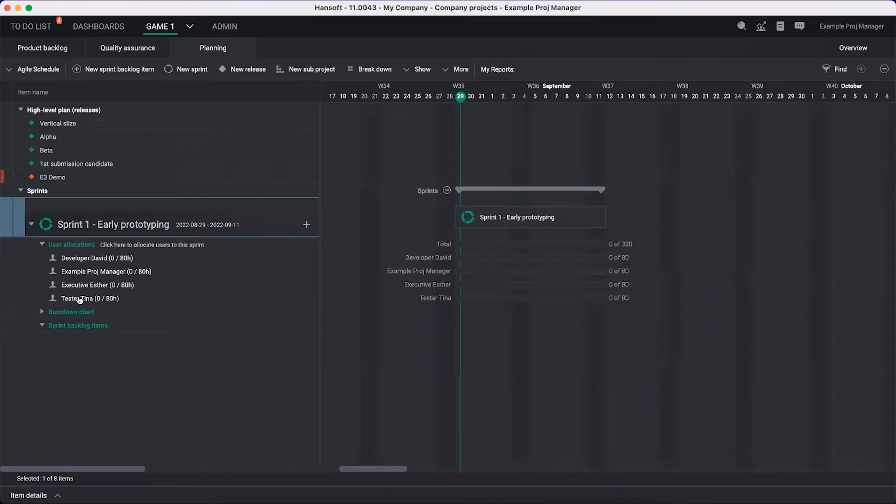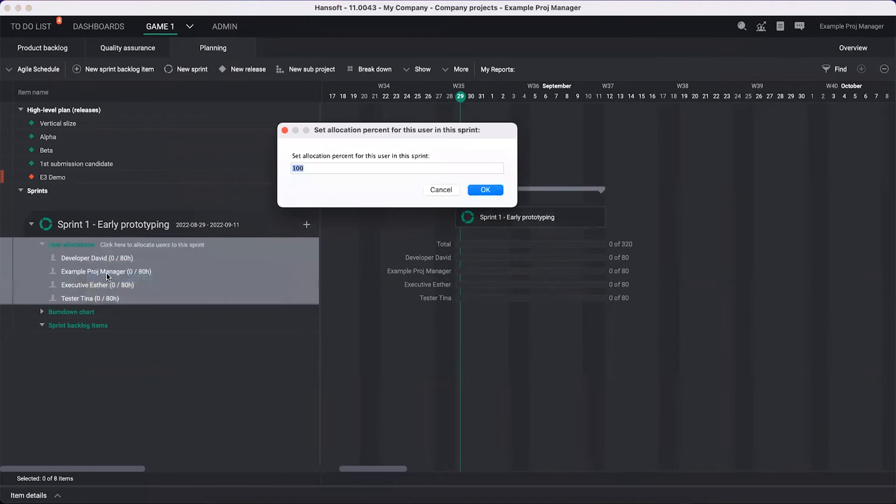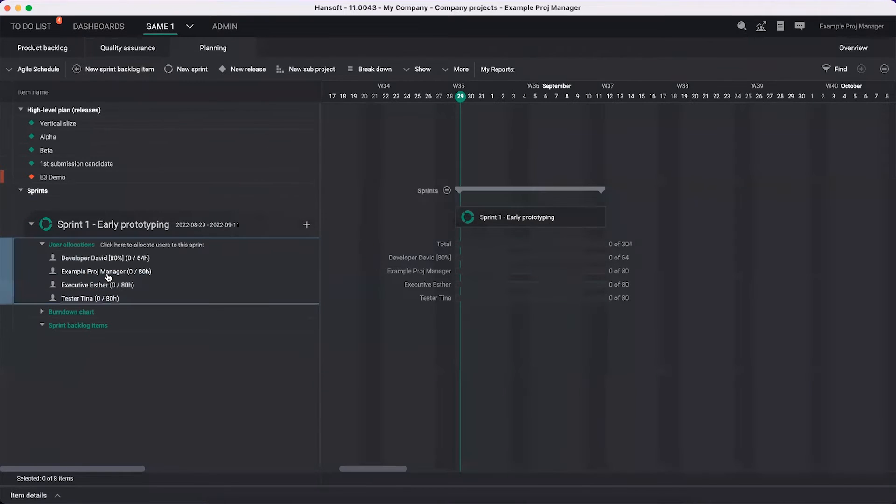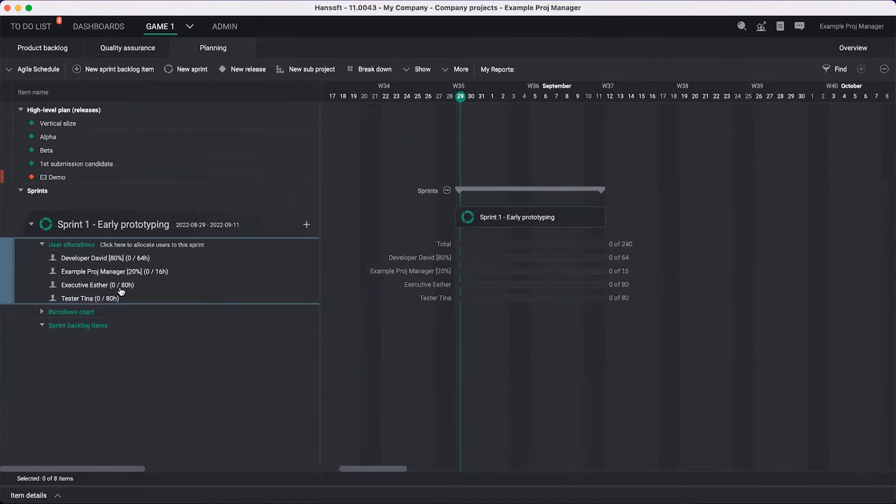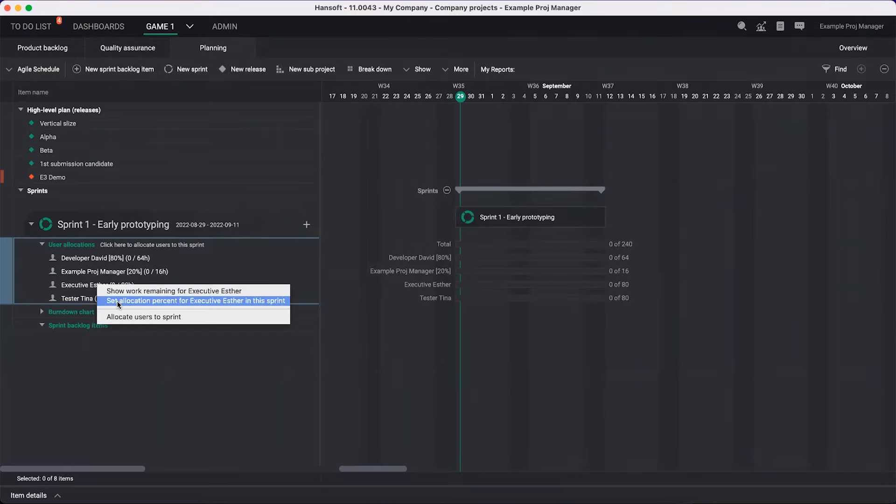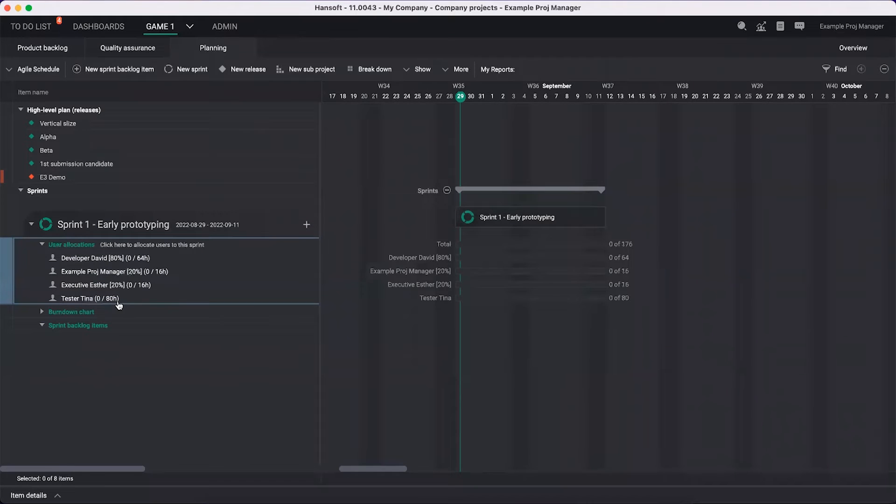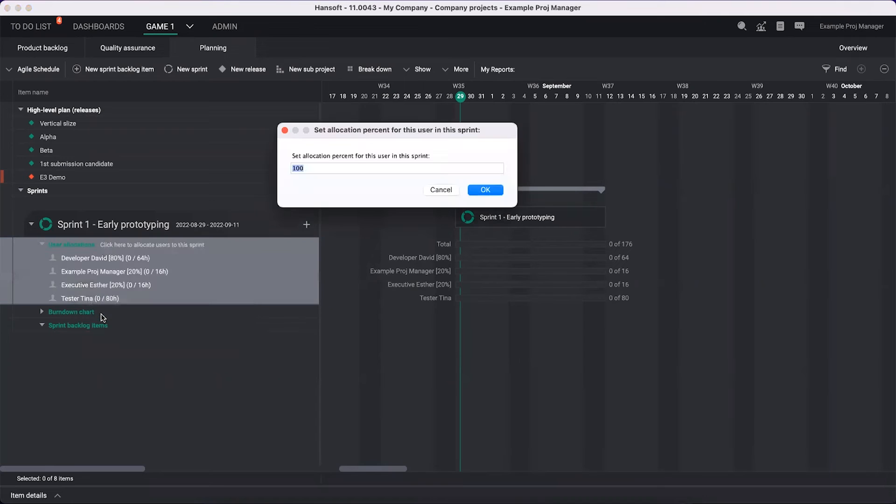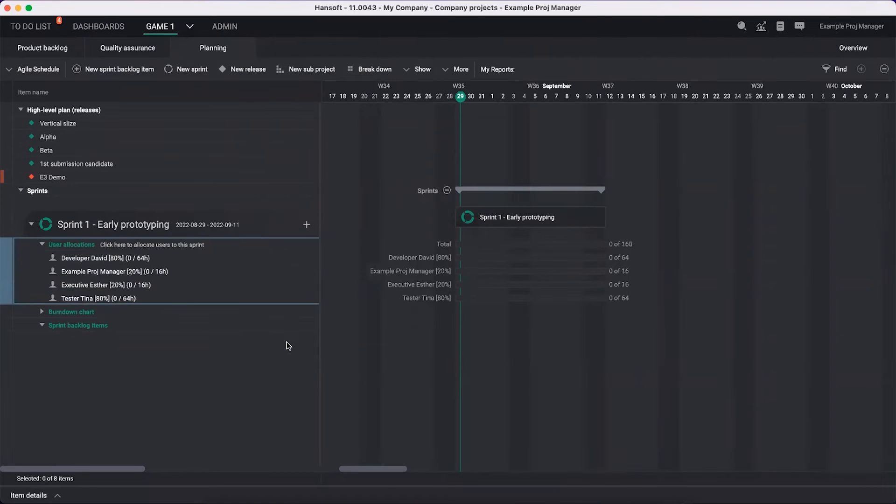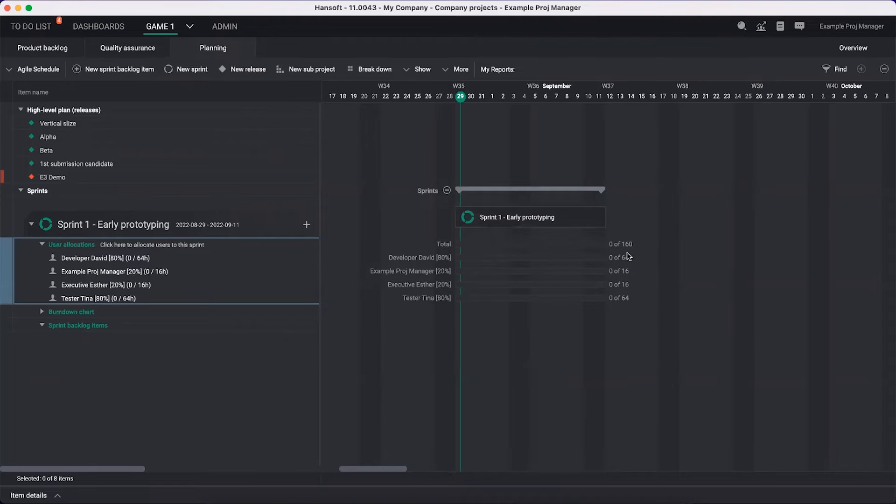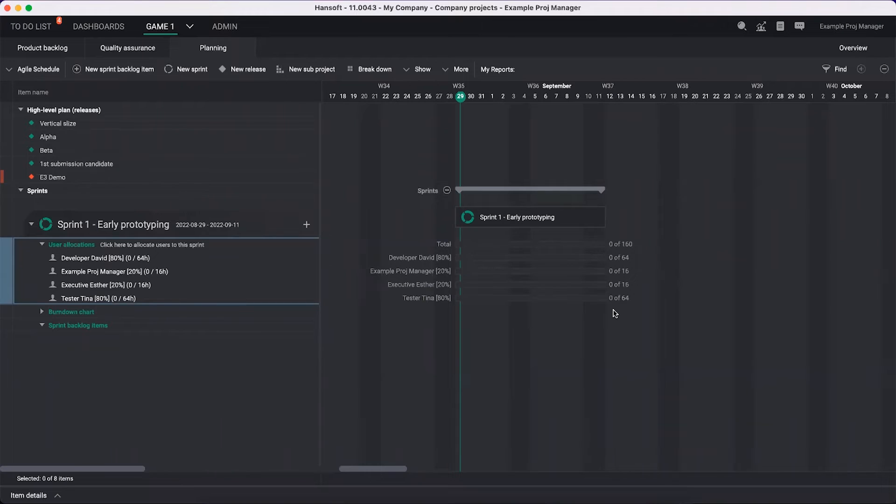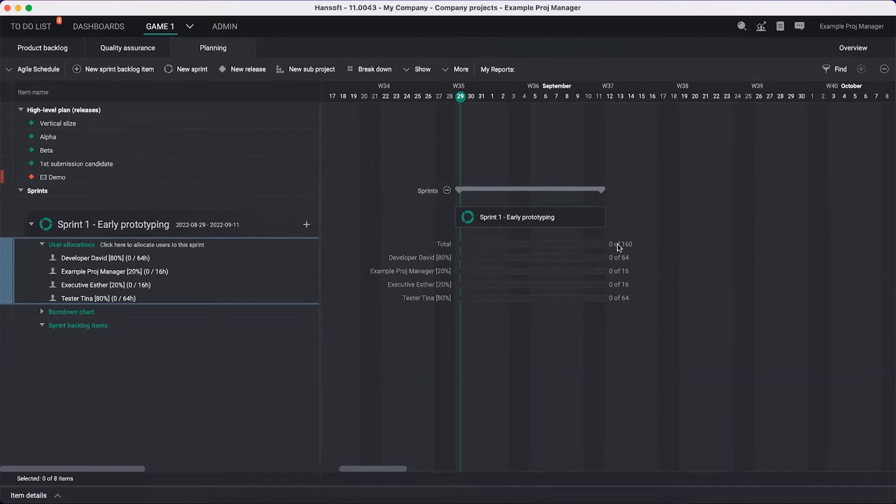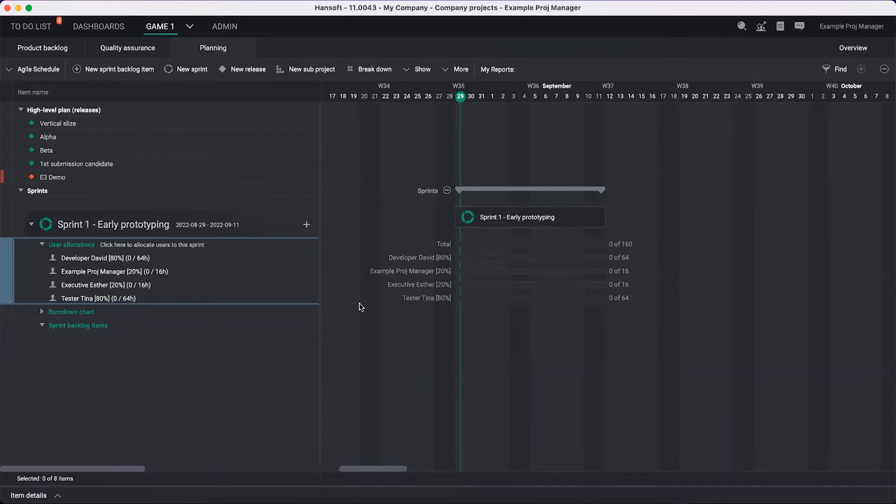The next thing we'll do is start looking at each individual person. Developer David, maybe 80% is a common allocation percentage. Example project manager, very busy with other things, not that much time. Executive Esther, maybe the same thing - running around looking for funding everywhere. Tester Tina is maybe also 80% of our time available. We're now down to roughly 160 hours of available capacity in the next two weeks. These people have different skills and capabilities, though in small projects everyone is wearing many hats. We have a rough understanding of how much work we can put on this team and on each individual. So now we have locked in our time and cost for the next two weeks. We will be working primarily with the sprint backlog.